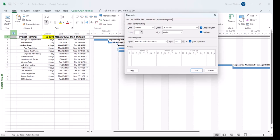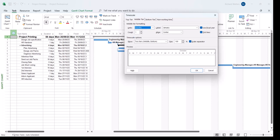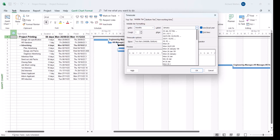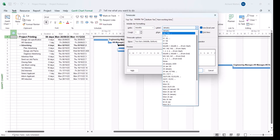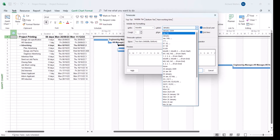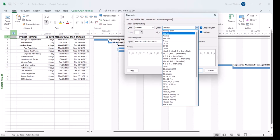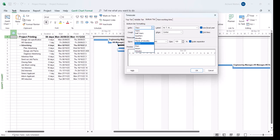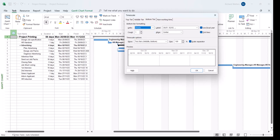For the small project we're now looking at, we've got a 56-day project. A better middle-tier unit would be months, every month. It should say three months altogether. And we'll say the month needs to have a month and year format. And bottom-tier, the logic here would be every week in the month, a week and we'll leave the format that the project has given us. I'm going to click OK.